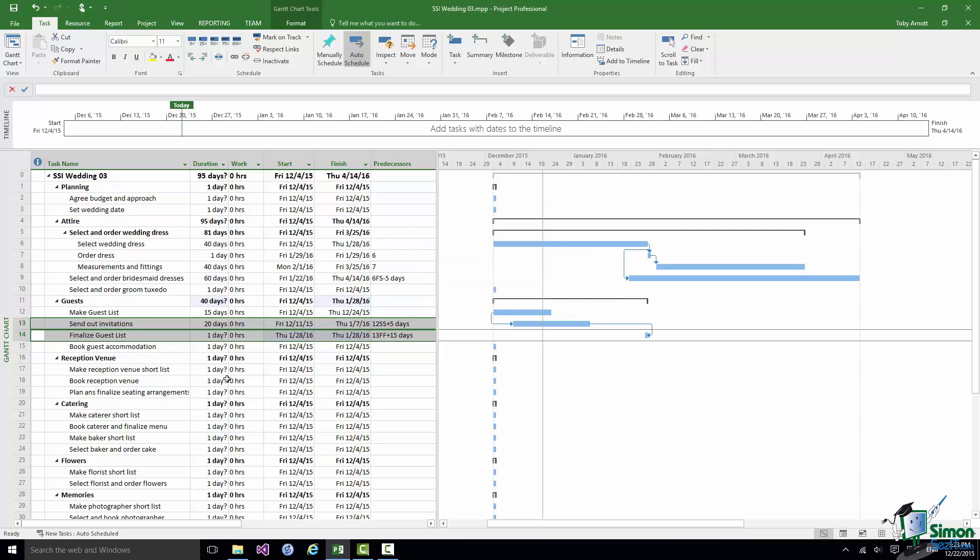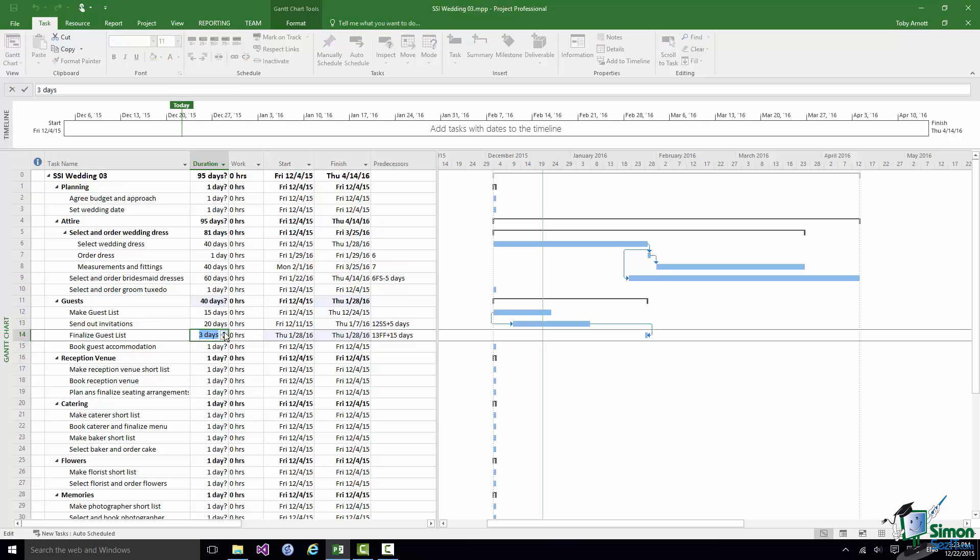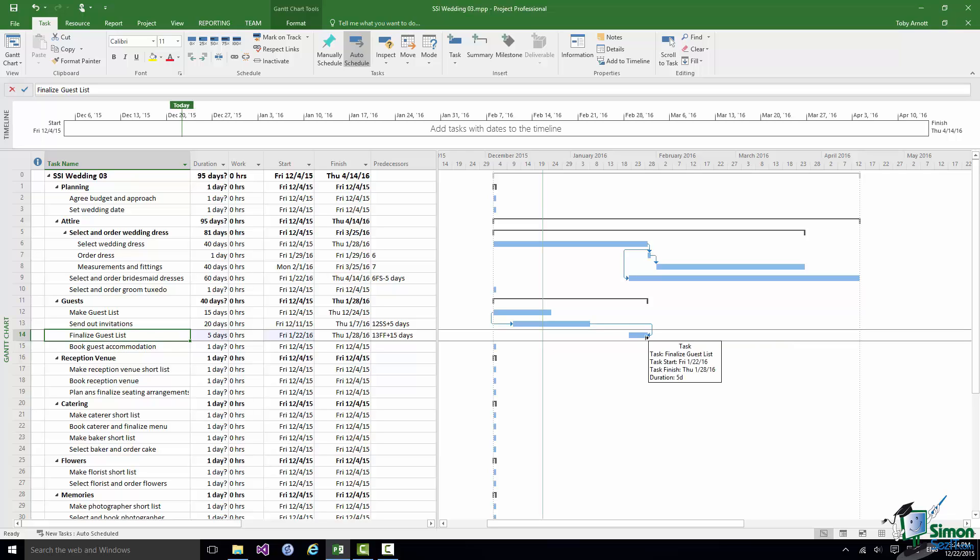And I'm going to say that Finalize Guest List is just say a five day task. And what you can see there is a situation where at some point before our deadline we're going to start to finalize the guest list but we're not actually going to be able to finish it until 15 days after we've sent out the last invitation.